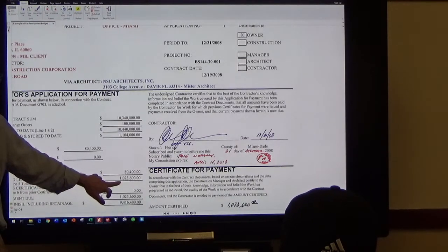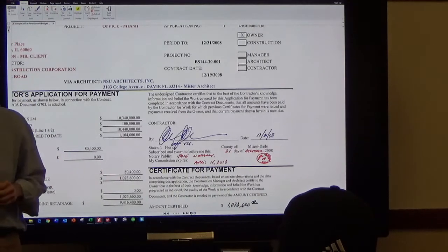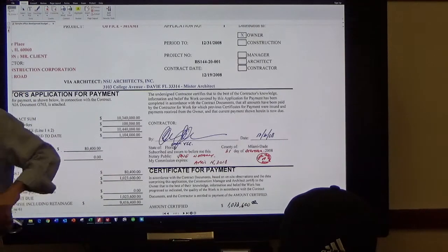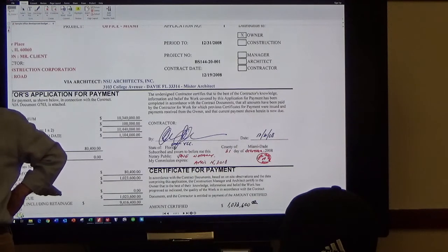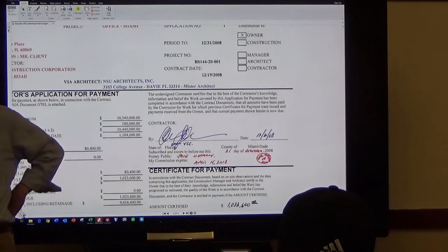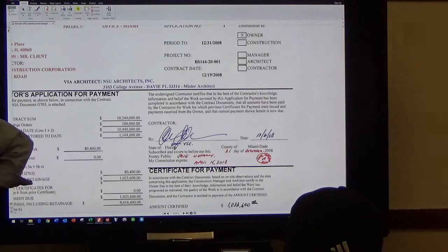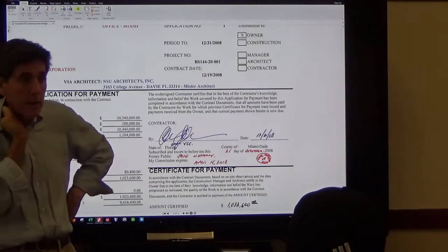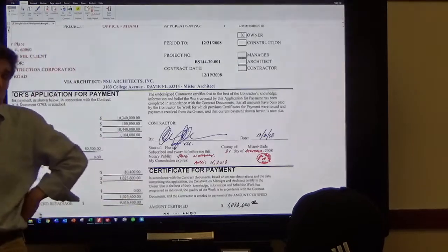Something I forgot is another way to protect yourself. So typically when you work with a contractor, you retain part of the payments. There's something called retainage, okay, so that's negotiated. I'll tell you a rule of thumb coming out of the box is you would pay a contractor 90% of what his billings are, and you retain 10%. You may have a lower amount.